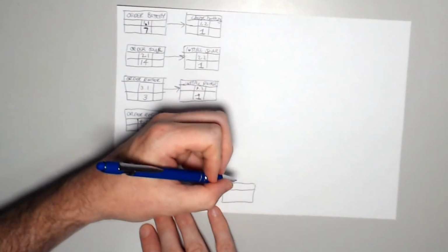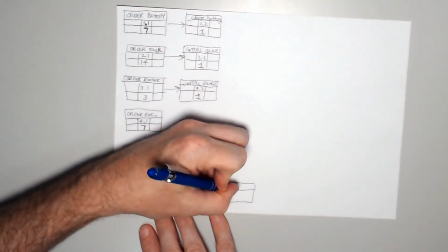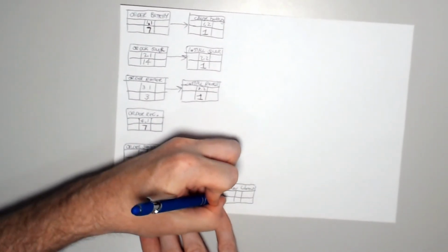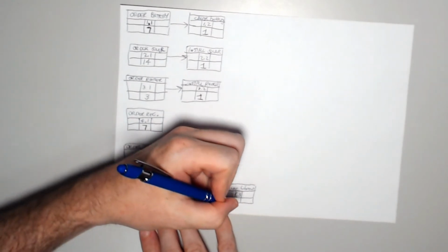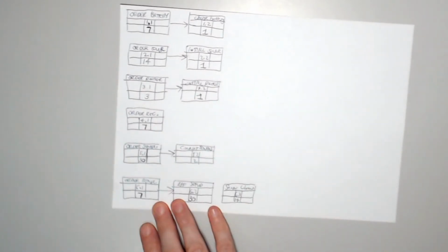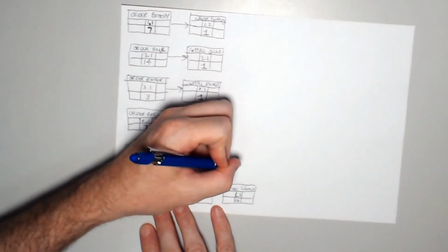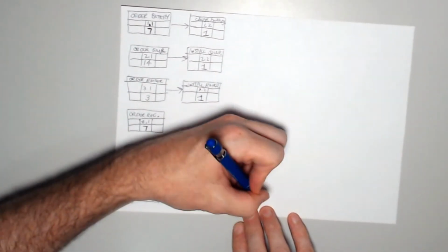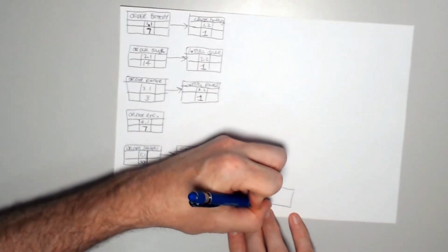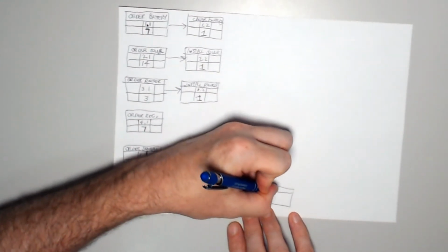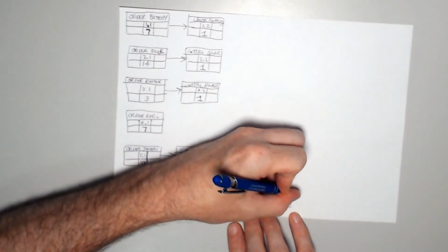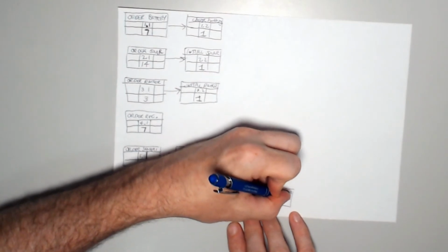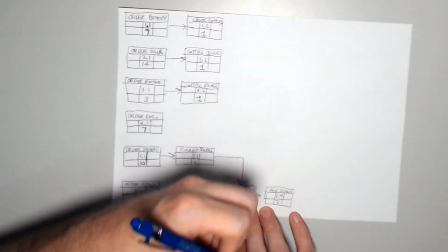So we're going to program our sensor libraries here. So this is task 6.3. It's going to take a long time to do that, 14 days. And to do that, we need to connect the sensors up. So this is a dependent task here. So once we've done our programming, we're going to test sensors. That's 6.4, and testing of the sensors is only going to take 2 days.